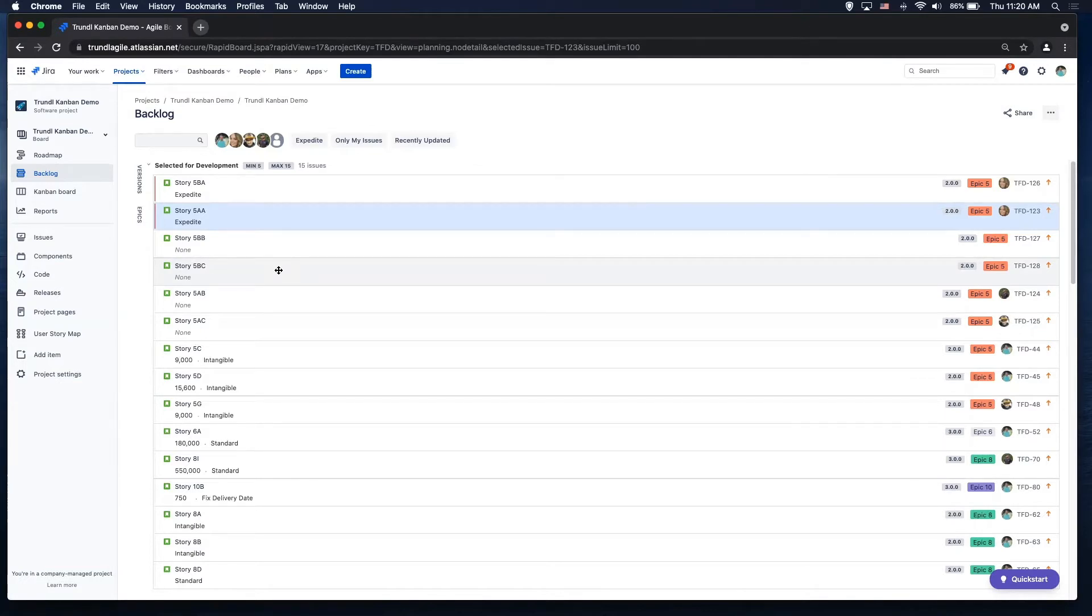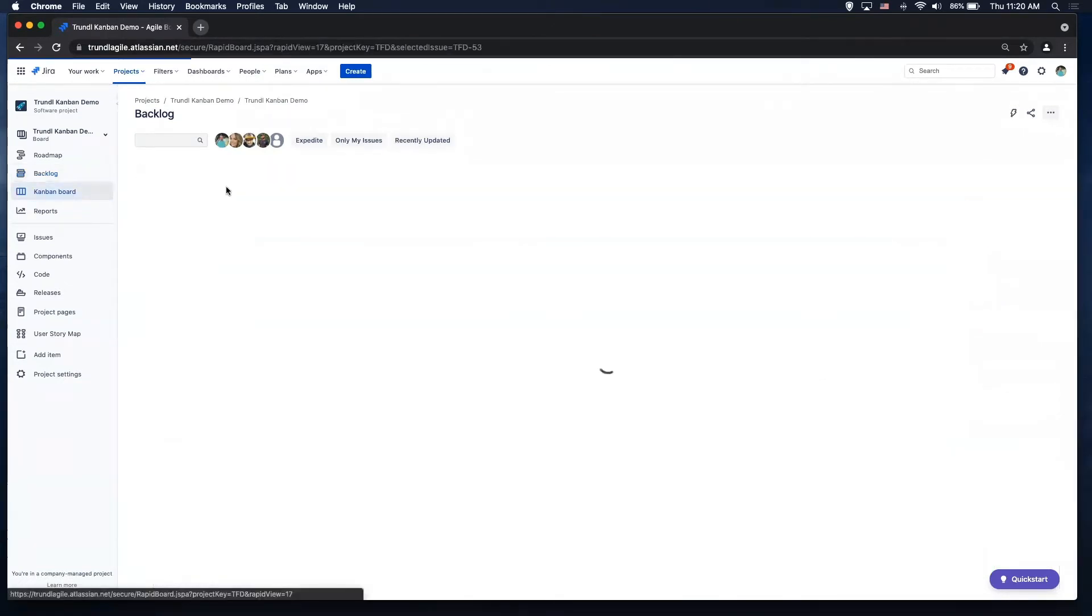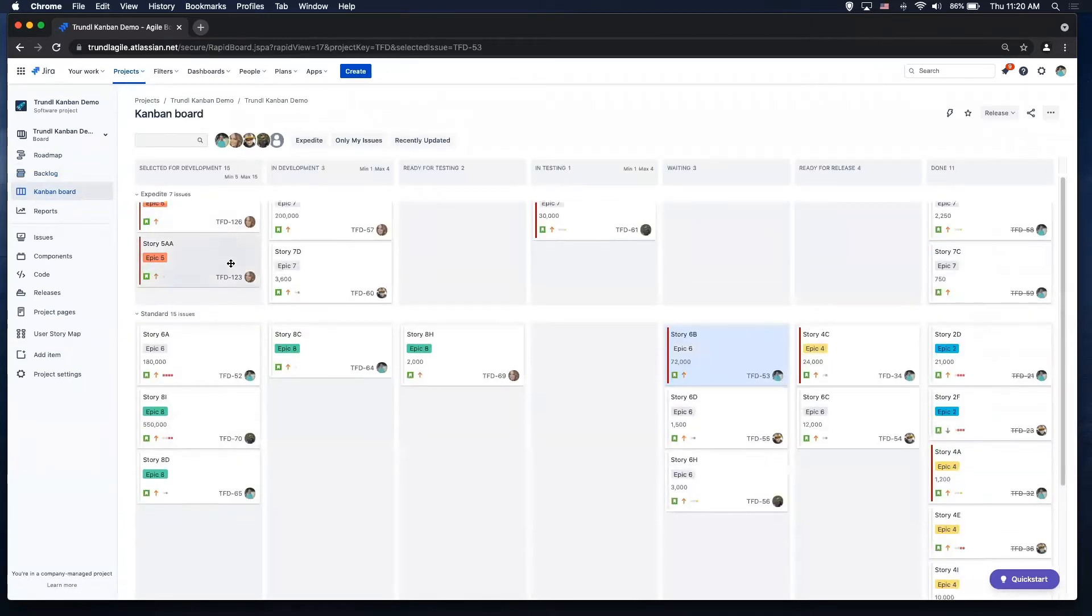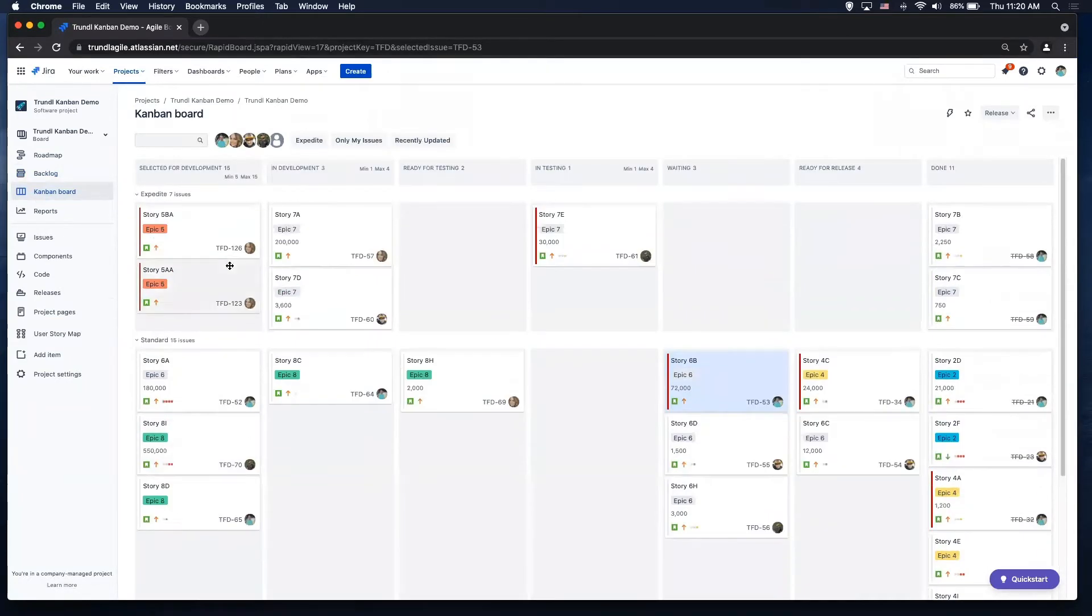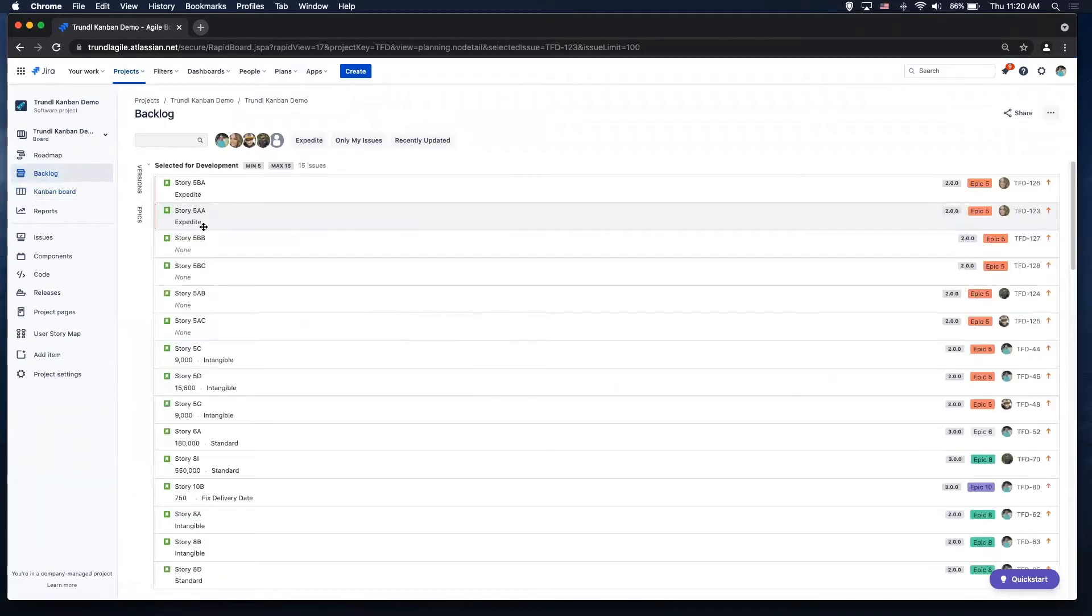So Atlassian creates this Kanban plan feature where you can put your first status in a backlog view, particularly because you don't want your far left status of your Kanban board to include all of your backlog, which would get very busy and make it hard for you to prioritize and add things potentially.